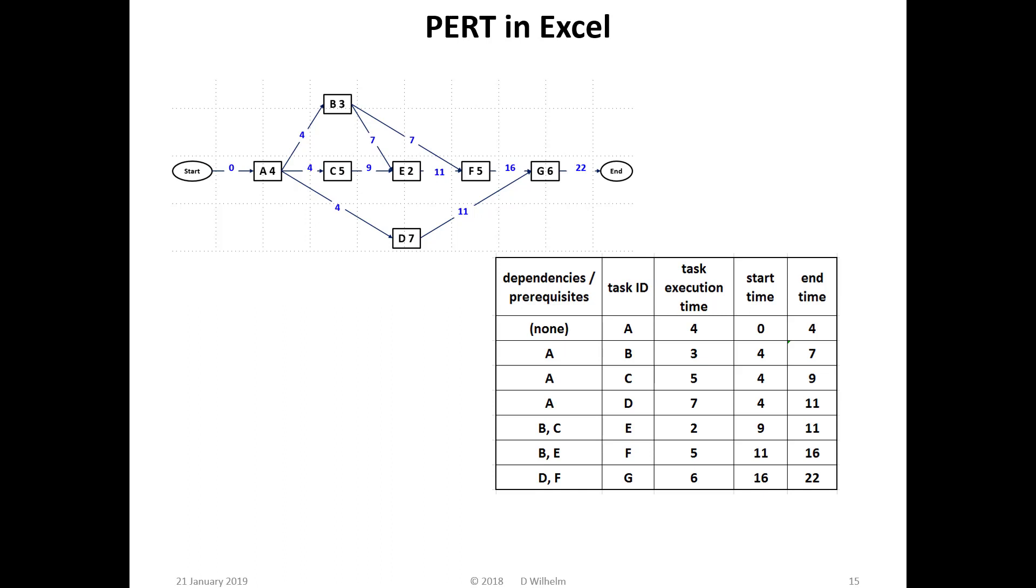For a task with a single prerequisite task, the start time equals the end time of that prerequisite task. For a task with multiple prerequisites, the start time equals the maximum of the prerequisite end times. So long as the topology of the project does not change, the Excel PERT version calculates accurate task start and stop times and the project cumulative elapsed time. To use the Excel PERT to determine the critical path requires manual intervention and must be redone each time a task execution time is changed.